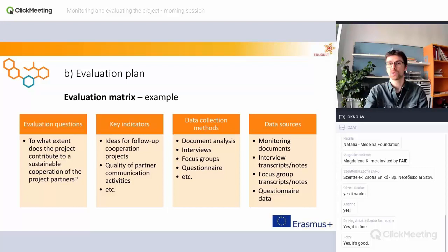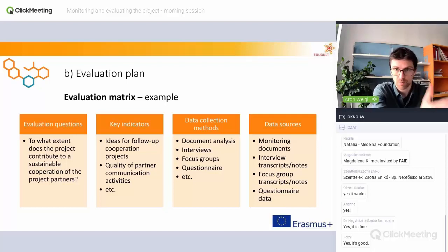So, and now we come to the second part, the evaluation plan. Or let's say this is the last step of the design of the evaluation, or the first step of the plan, whatever. But it's a very important link. We normally do it. It's some work, and if it's a small evaluation, perhaps you don't need it, but it's not bad to bring all the steps we had before into one table. You write down all your evaluation questions along the different levels, like here my questions for the input, here my questions for the output.